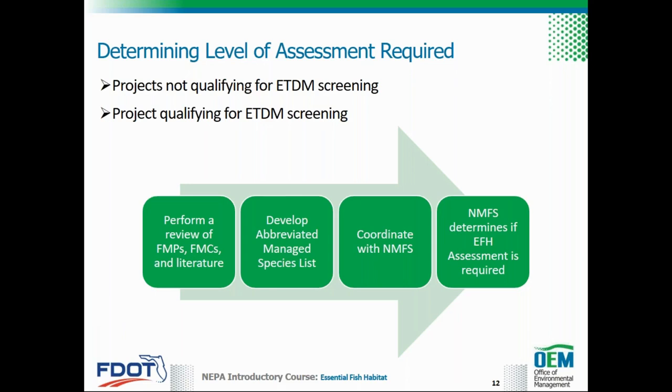Regardless of whether a project qualifies for ETDM screening, coordination with NMFS is required for federal projects with potential essential fish habitat involvement or in instances that require a federal action, such as a federal permit. To determine the level of evaluation for projects that do not qualify for ETDM screening, perform a review of fishery management plans, fishery management councils, and literature to develop an abbreviated managed species list and coordinate with NMFS.